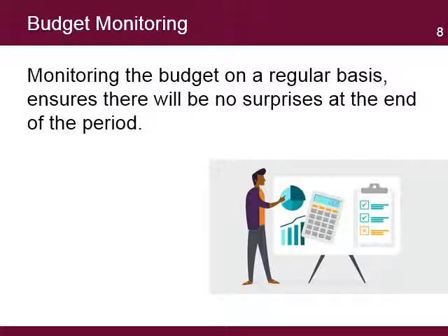The project manager uses the report to monitor how the project is using the budget, if there are any deviations from the plan, and how the remaining balance fares in order to complete the project as planned. There are two methods to show this information: by accounting code and by activity.